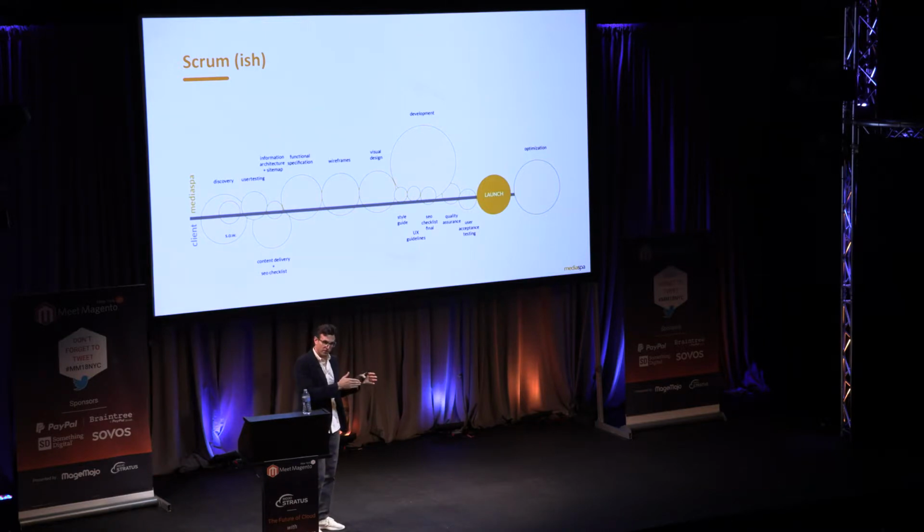Let's say, as was the case with our Easy Spirit build, we have an ERP integration that's going live in 2 sprints. At the end of the first sprint, you're not able to do end-to-end testing because the integration work isn't done. If you're following a proper agile process and completing the entire software development lifecycle, you will complete QA and UAT in each sprint.